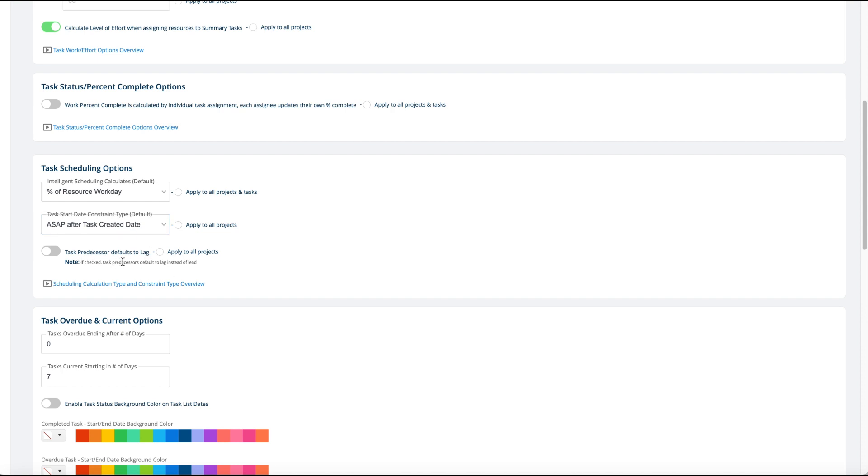Task predecessor defaults to lag. You can turn it on so that it's either lead time or lag time when you put a predecessor in there. Normally a predecessor has no lead or lag, meaning there's none whatsoever. But if you put five days of lag in there, that means there's a gap between them. If you want lead time, then that task starts and overlaps its predecessor. You can change that option here.